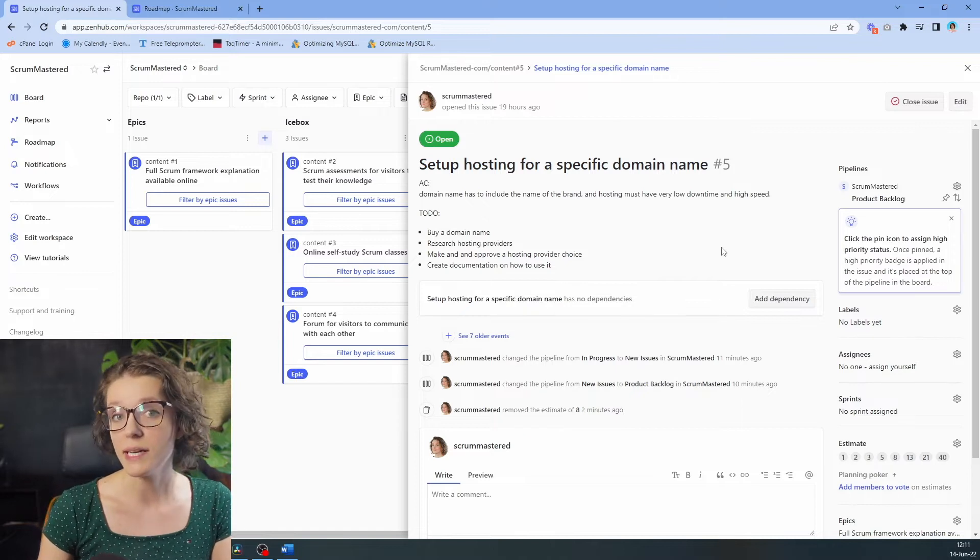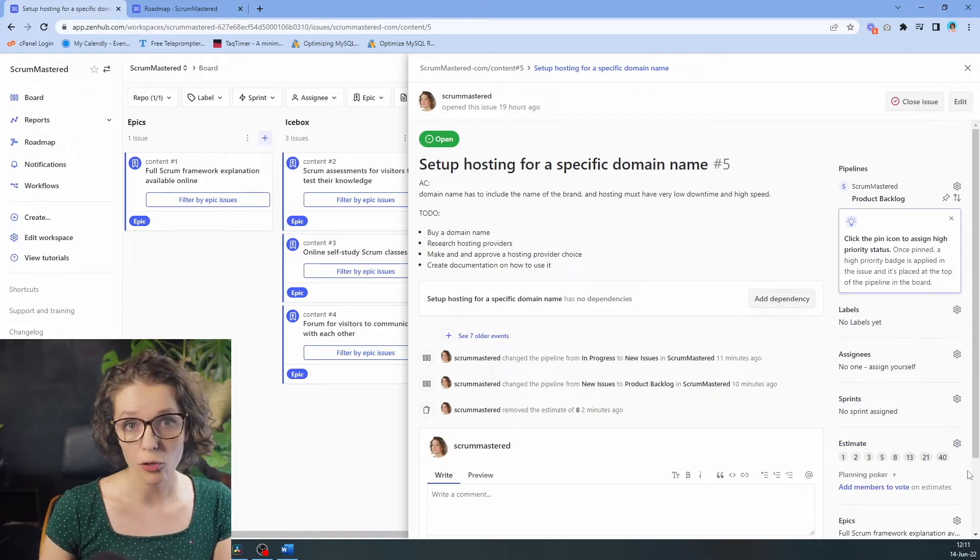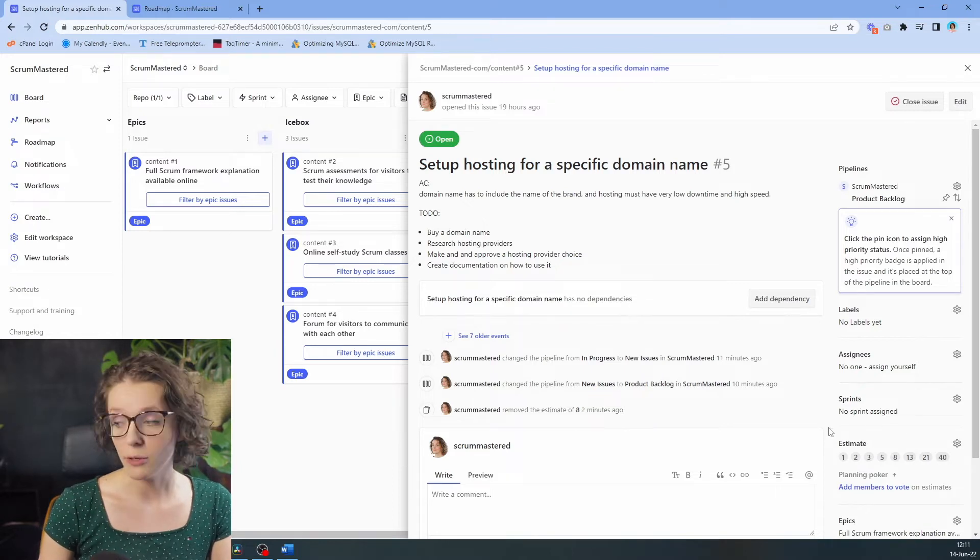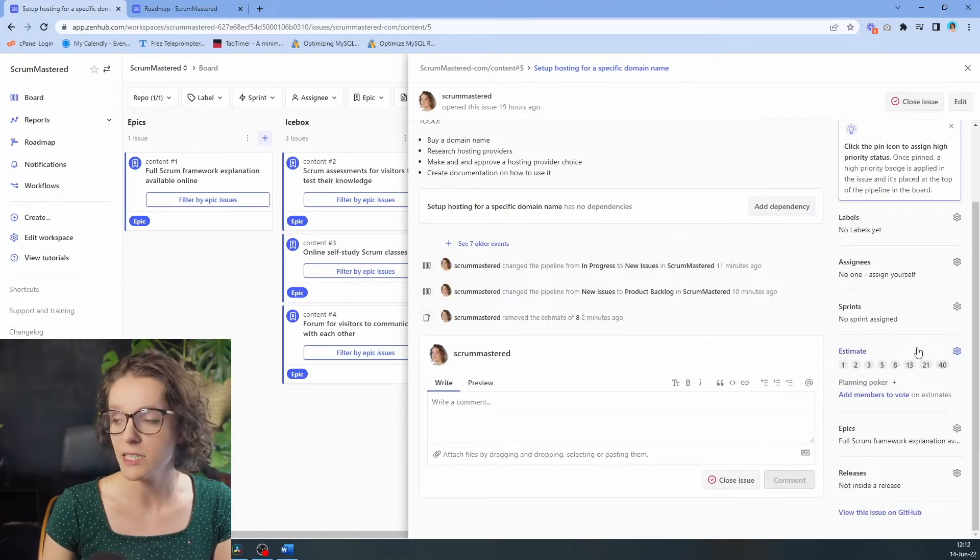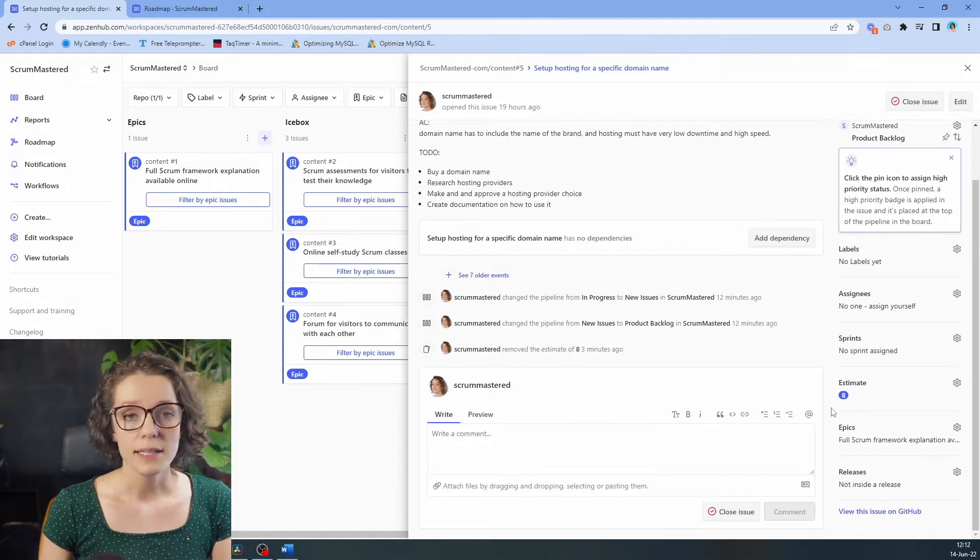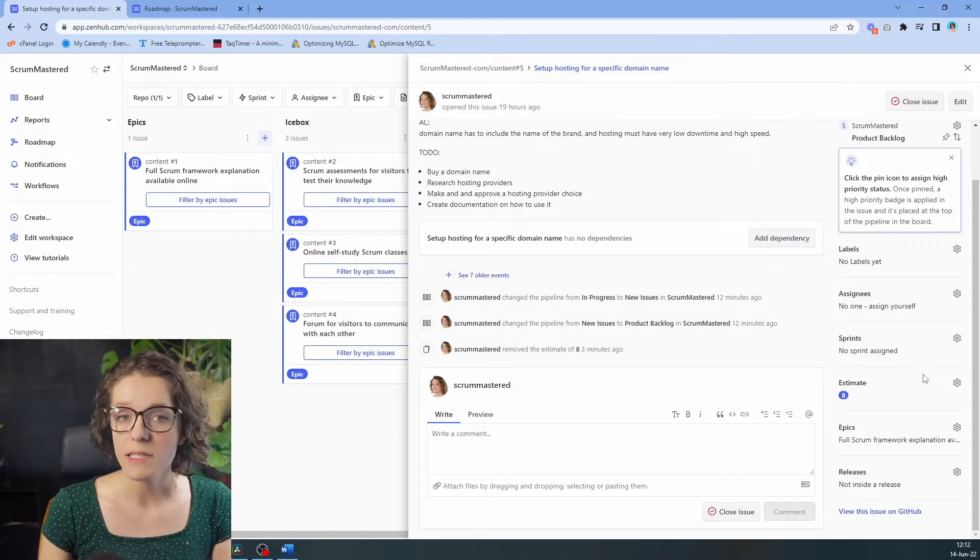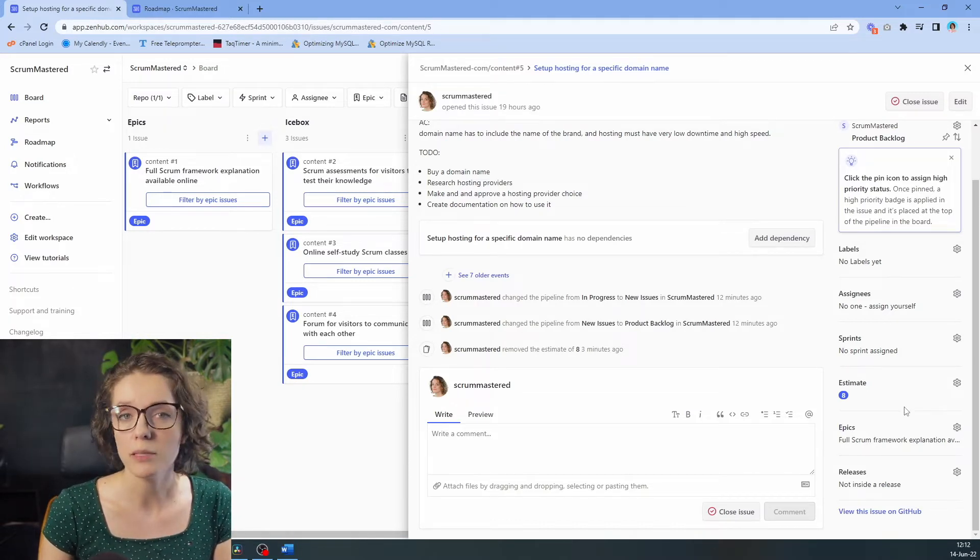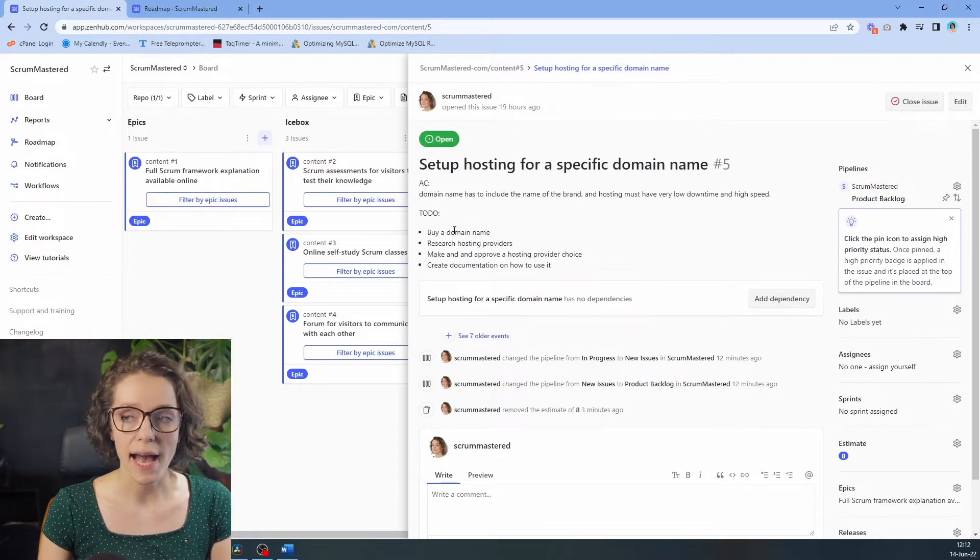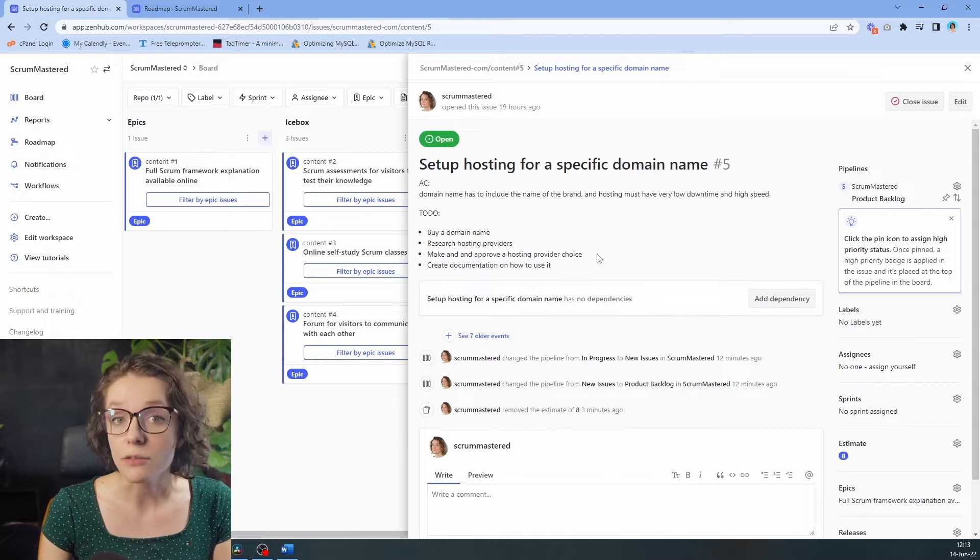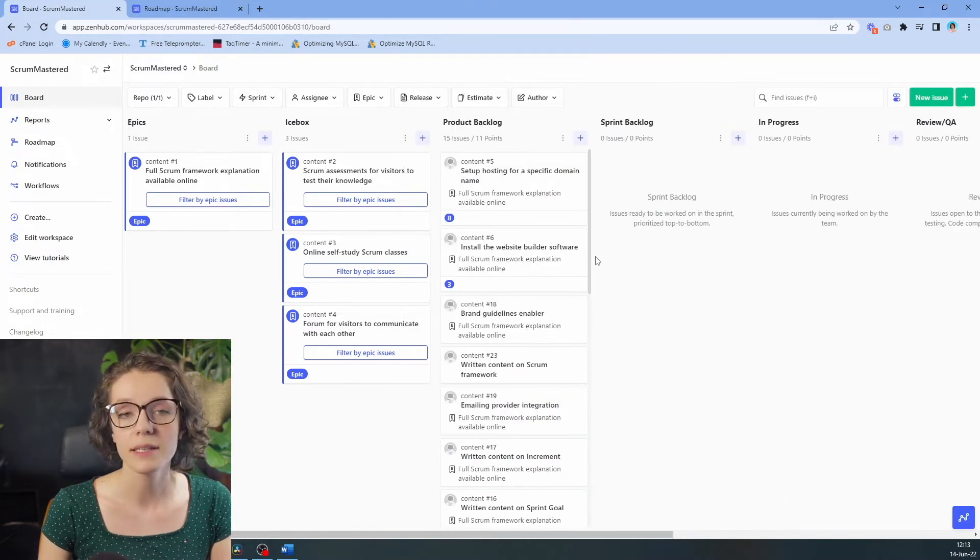The great thing about ZenHub is that they do have a planning poker already integrated in their software. Let's say that I have decided to estimate it as an eight, so I choose eight. This is my estimate that I have added, and then once everybody adds their estimates, we will be able to see who voted what and we will be able to discuss it in more detail, potentially adding more to-do tasks in here, or maybe redefining some of the criteria.